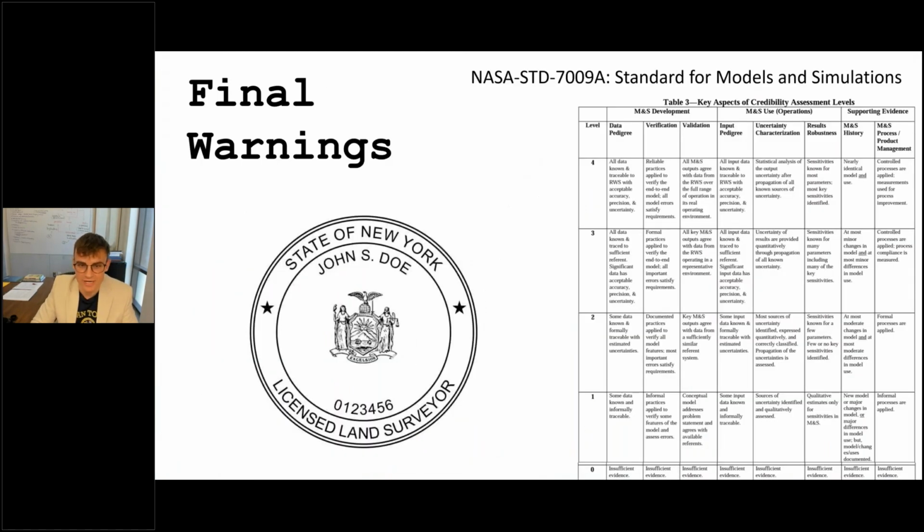And a final warning: unless you have a licensed surveyor on staff or contract a licensed surveyor, claiming you've done survey can get you into trouble. And two, it's your responsibility to explain to the client the concept of the accuracy food chain. Explain to them what the data can be used for and shouldn't be used for. Like, it's easy to do something for dimensional validation and then repurpose it for marketing, but going the other way, not so much.